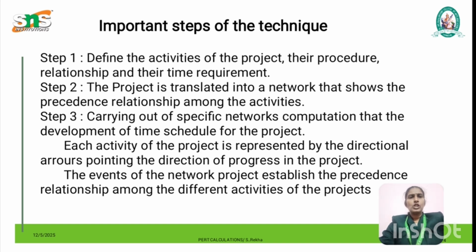Okay. So let us see what are the steps of the technique and how to construct the network. We can see using the network techniques. The first step is that we have to define the activities of the project, and already I have told that there are three time estimates. Then we have to find the relationship among the activities, and third is network computation, the development of the time schedule. Each activity is represented by an arrow diagram because the event is connected with two nodes.